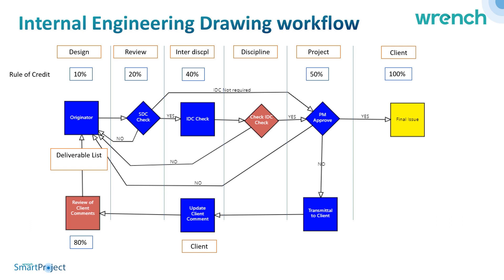Each deliverable can be specified with a predefined workflow defined as per the organization's process. In this example, a drawing originates in one discipline, is reviewed in the same discipline, then goes through an interdisciplinary check, then to the project manager, and is submitted to the client. For each stage you can specify the responsible resource and define a weightage — called rules of credit — so that when you complete an activity you earn that progress.